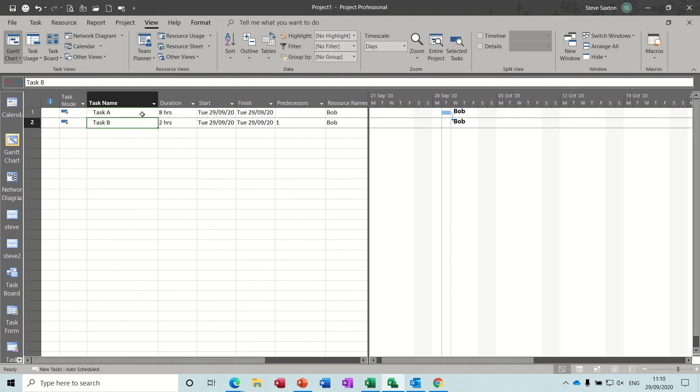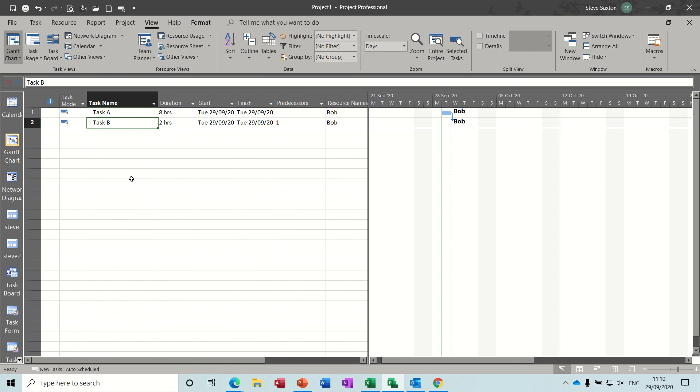So it's just an additional tip, but that's basically all I want to talk about in this little session, how you can create overtime by adding overtime through the resource usage sheet, and also how you can change the overtime with the amount of hours worked as a standard calendar by adding the extra two hours in there, which is quite often what a lot of people do. They do actually do, like 10 hour shifts, and then have a few days off, and then, so Monday, Tuesday, Wednesday, could be 10 hours, and then three days off, or two days off, or whatever. That's how you would set that up in the calendar.